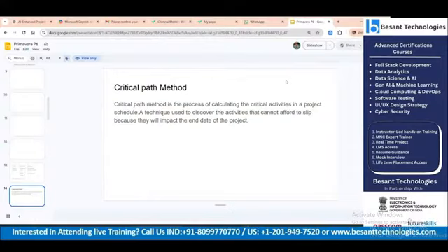In order to reflect the delays or early timelines, whatever influences one activity versus another. It's the reality in site conditions. Even on site, it is going to happen. If one activity gets delayed, it will automatically have its own effect on its subsequent activity. So the same we are reflecting in the software as well.